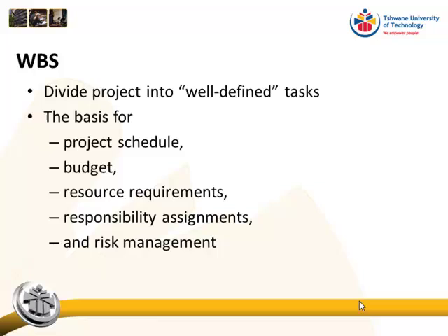At the end of the day, the work breakdown structure is one of the most important pieces of information on your project, because it's the basis for your project schedule, your budgets, your resource requirements, your responsibility assignments, and risk management. As I said last time, your quality goes back to it, your change orders go back to it. So the work breakdown structure is very important, and it's very important to get it right.